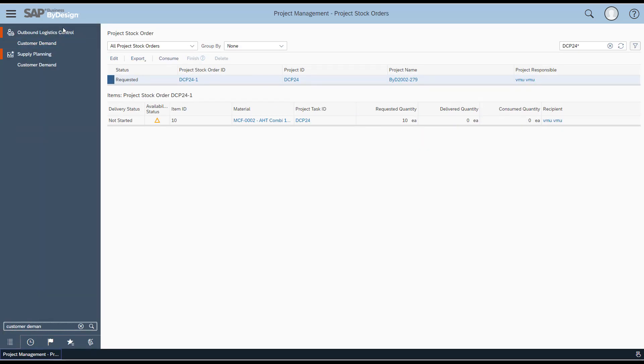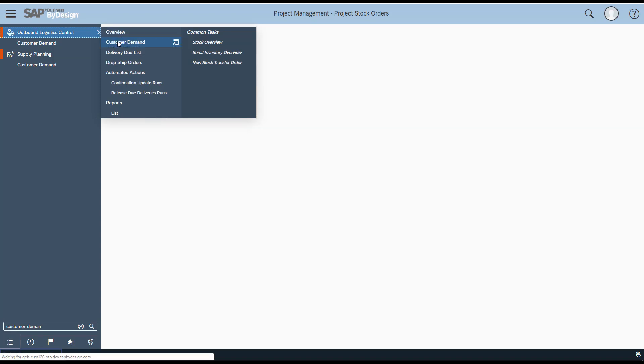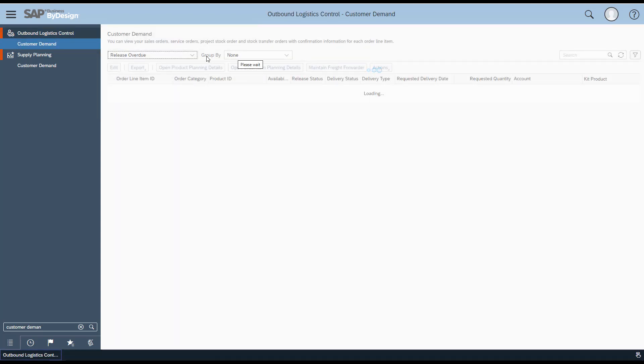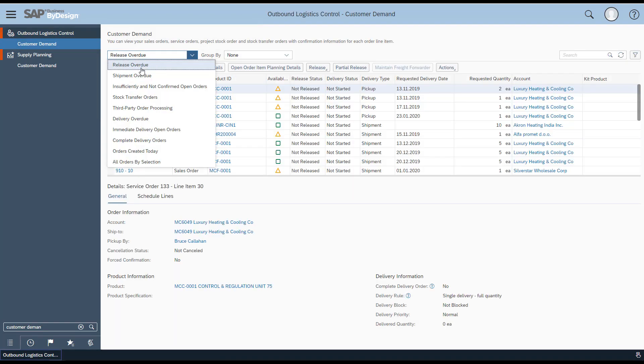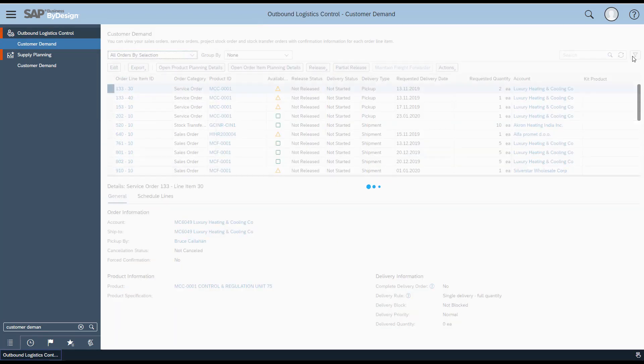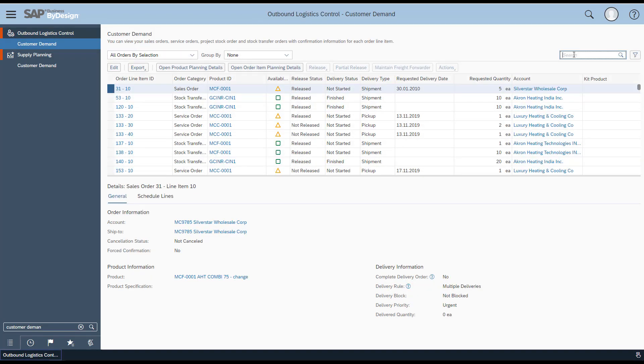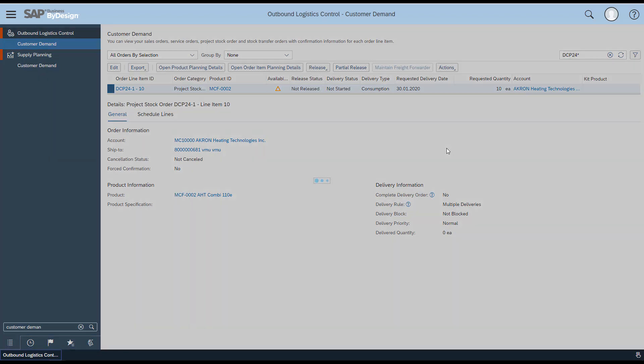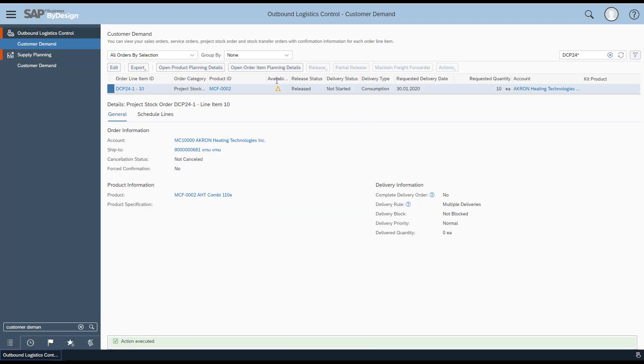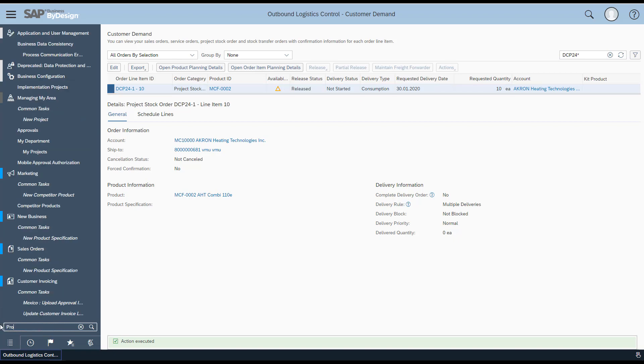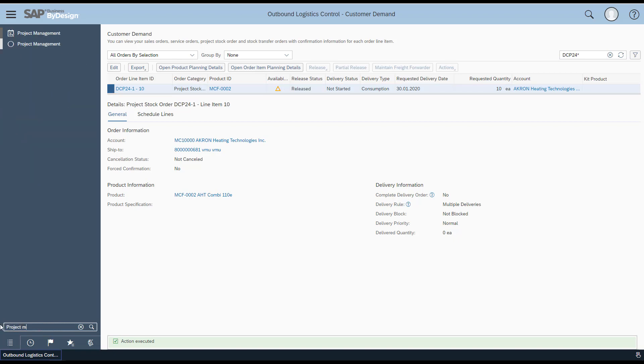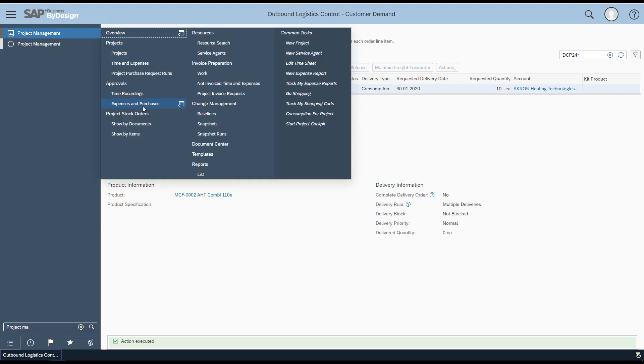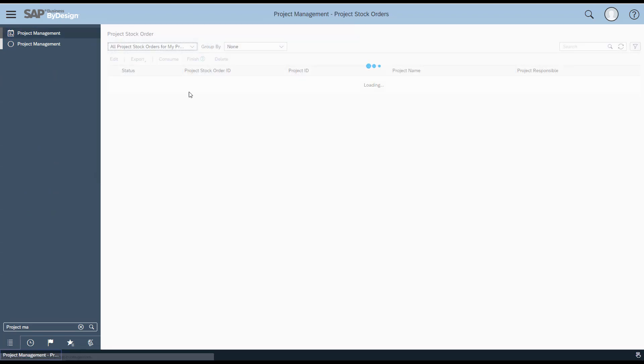Search for the Customer Demand work center view and look for the relevant customer demand of the project you just created. You'll see that it is in status 'Not Released.' Release the customer demand. Once the customer demand is released, the relevant project stock order would not let you change the delivery date—that's the desired behavior.